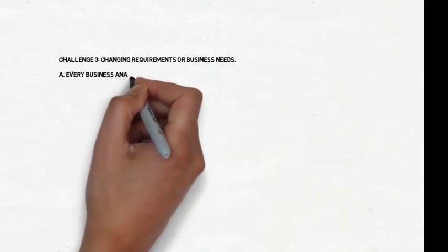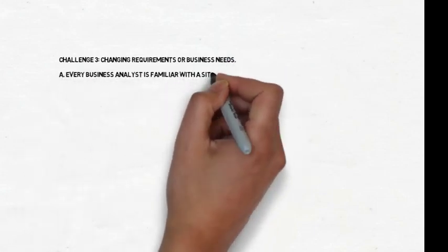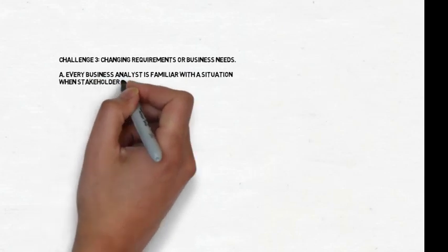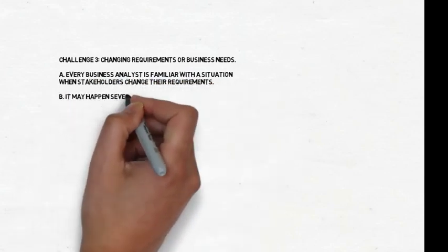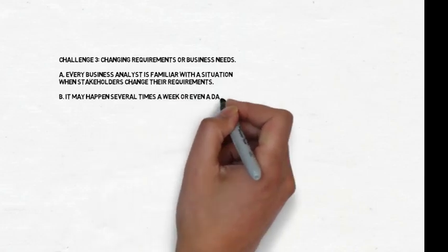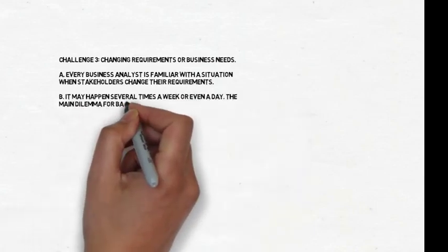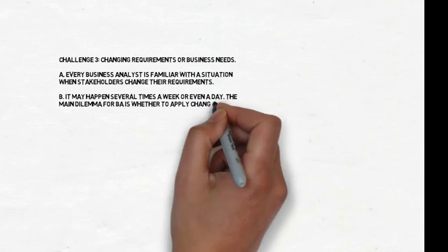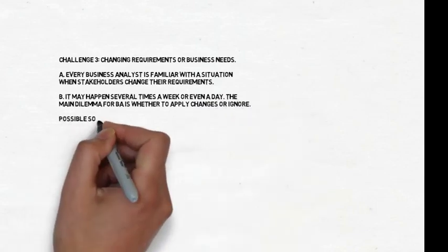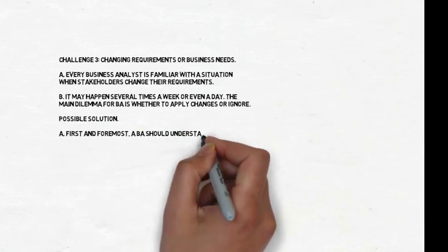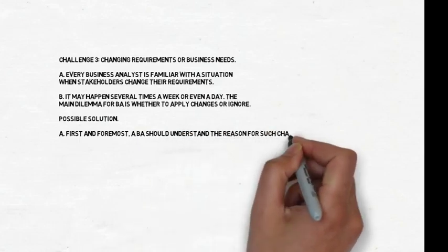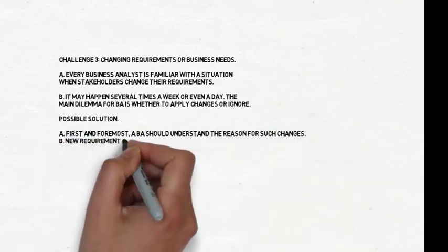Every business analyst is familiar with a situation when stakeholders change their requirements. It may happen several times a week or even a day. The main dilemma for BA is whether to apply changes or ignore them. Possible solution. First and foremost, a BA should understand the reason for such changes. New requirements have to be accepted considering planned project deliverables.